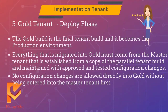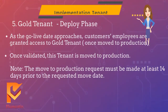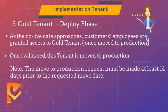Gold Tenant. The gold build is the final tenant built and it becomes the production environment. Everything that is migrated into gold must come from the master tenant that is established from a copy of the parallel tenant build and maintained with approved and tested configuration changes. No configuration changes are allowed directly into gold without being entered into the master tenant first. As the go-live date approaches, the customer's employees are granted access to the gold tenant after move to production. Once validated, this tenant is moved to production. Note: the move to production request must be made at least 14 days prior to the requested move date.